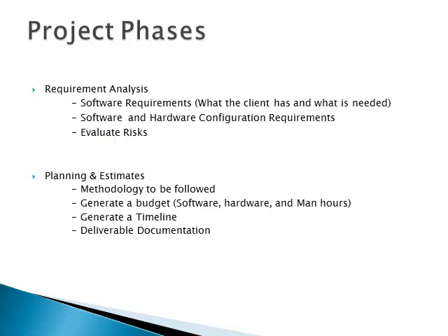During the requirement analysis phase, the software requirements and the software and hardware configuration requirements were examined, and any risks were evaluated. During the planning and estimates phase, the methodology was created, a budget for software, hardware, and man-hours was generated, and a timeline and deliverable documentation were generated.